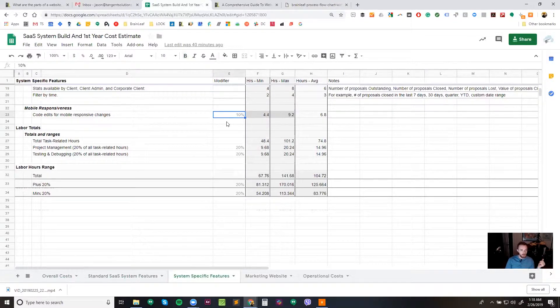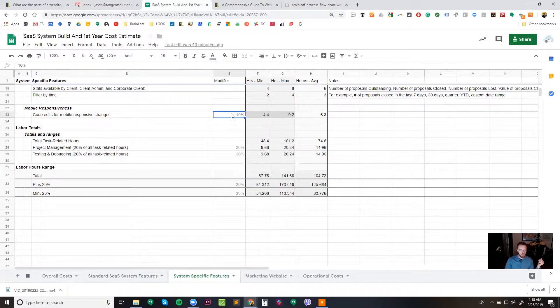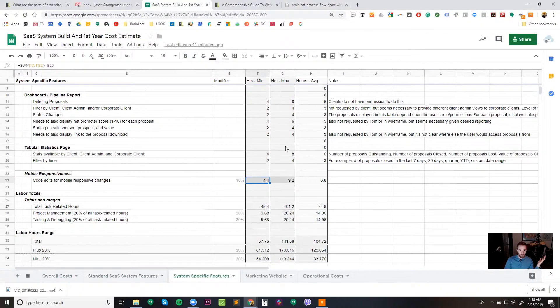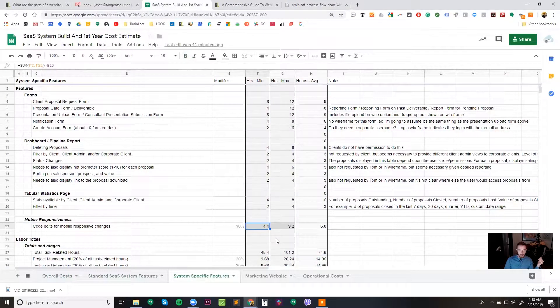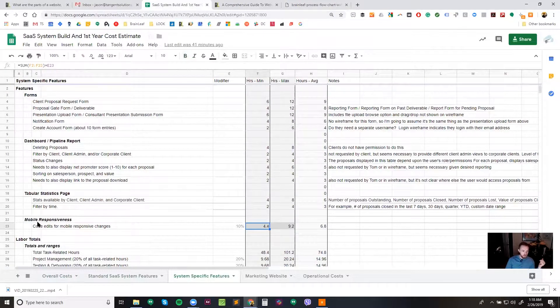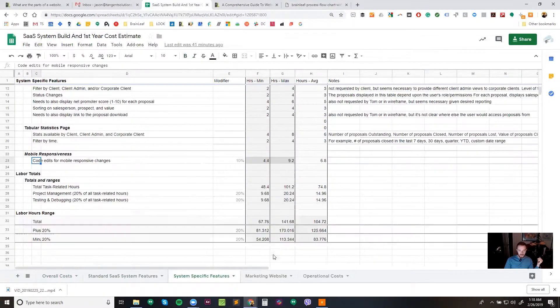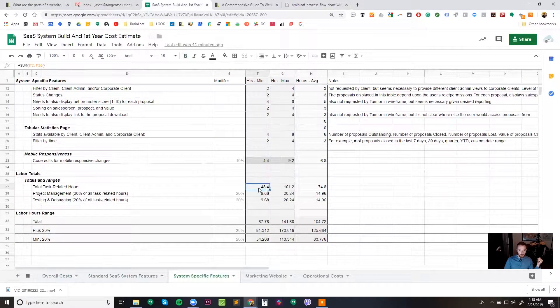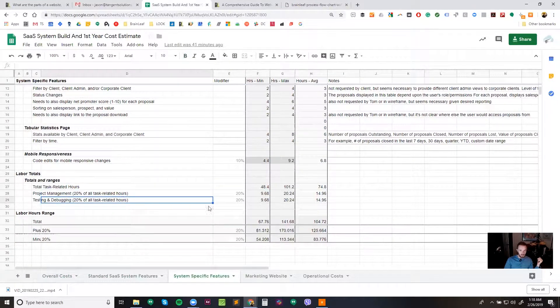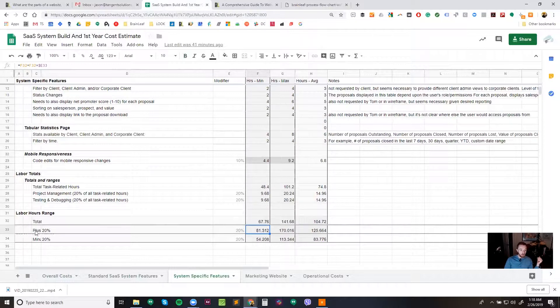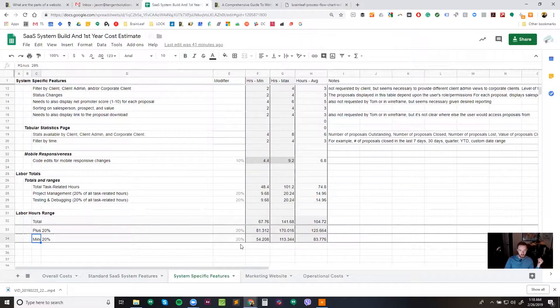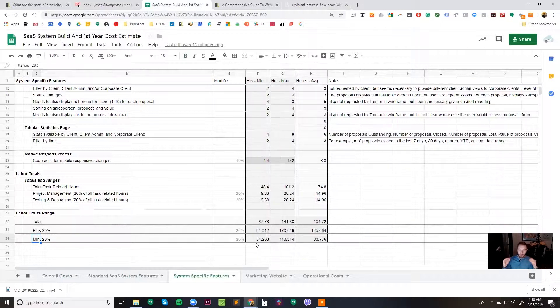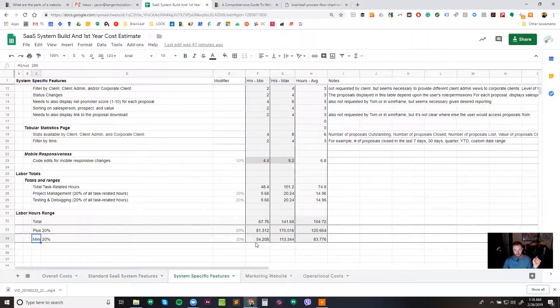So this will be super long very often, and it's all added up the same way we've got everywhere else. I don't think I showed you how these percentages are done. So this is percent, and we just do a sum times that percent. So here you can see the sum of these items times this percent equals 4.4. And that gives us the mobile responsiveness on that, which gets added to the total into here. And then we've got our percentages again here and here, and our totals.